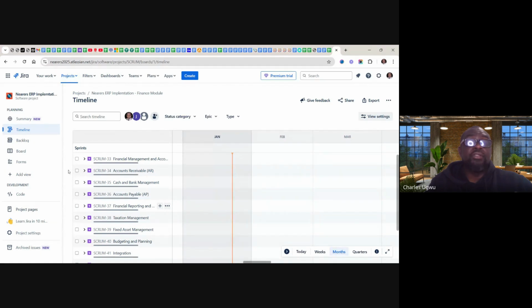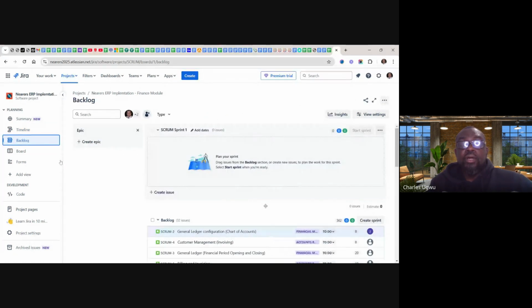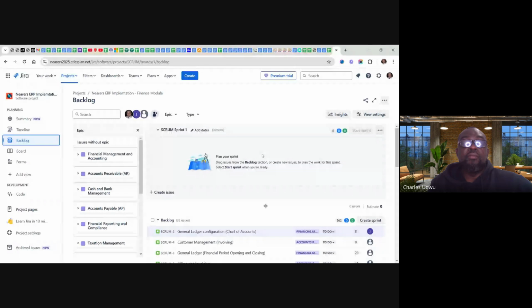At least we can't finish everything. Product backlog refinement is a continuous process. So we just have to refine the items we plan to use tonight for this sprint planning, and we can move items to sprint. You can see this is the sprint environment. It's vacant, nothing is happening, so we need to move items to sprint as quickly as possible.